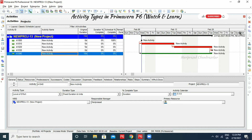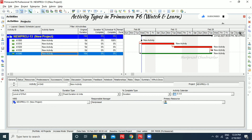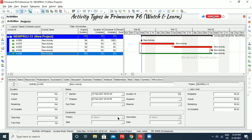So totally we've seen Task Dependent, Resource Dependent, Level of Effort, Start Milestone, and Finish Milestone. We also have WBS Summary. WBS Summary is also similar to Level of Effort. Level of Effort is typically used for ongoing tasks that depend on other activities, and duration is determined by predecessors and successors. We can put clerical work, security guard, or meetings as Level of Effort. But we can't assign any constraints to a Level of Effort activity — when you click on it and go to Status, the constraints option is invisible.